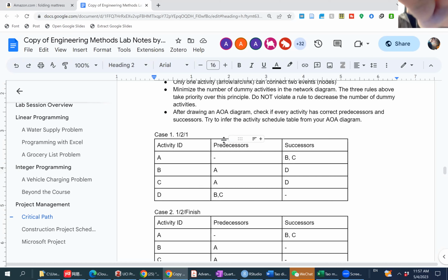But it's not too far away. What's missing is this part. So what's complex is that D connects to E and also F, right? After that, we also need a finishing line. These two connect back to the finish. Yeah, so see here that D goes to F and D goes to E and C goes to E. You're correct in the first part. Now we just need a finishing node.